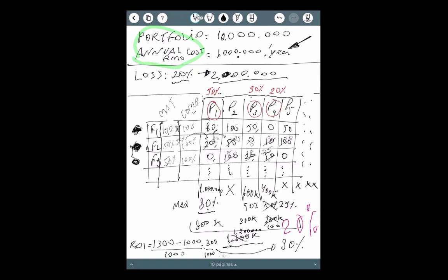of your organization, okay? Let's suppose that you have a negative ROI, like negative 100. It means that maybe you are on the wrong path. And why? Maybe because your PMO is too expensive. Maybe because you don't have maturity or competence, right? And also sometimes it's because your portfolio is too small.